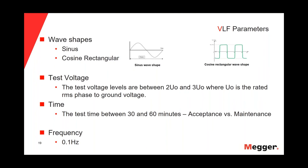The test voltage applied is between two times U0 and three times U0, where U0 is the rated RMS phase-to-ground voltage of the cable. The test time is between 3 and 60 minutes. There is some ambiguity between the European standards and the IEEE standard regarding test time. If we are doing a commissioning or acceptance test, we are looking mainly for workmanship issues or manufacturing defects — there is no way we have water trees in a new cable.